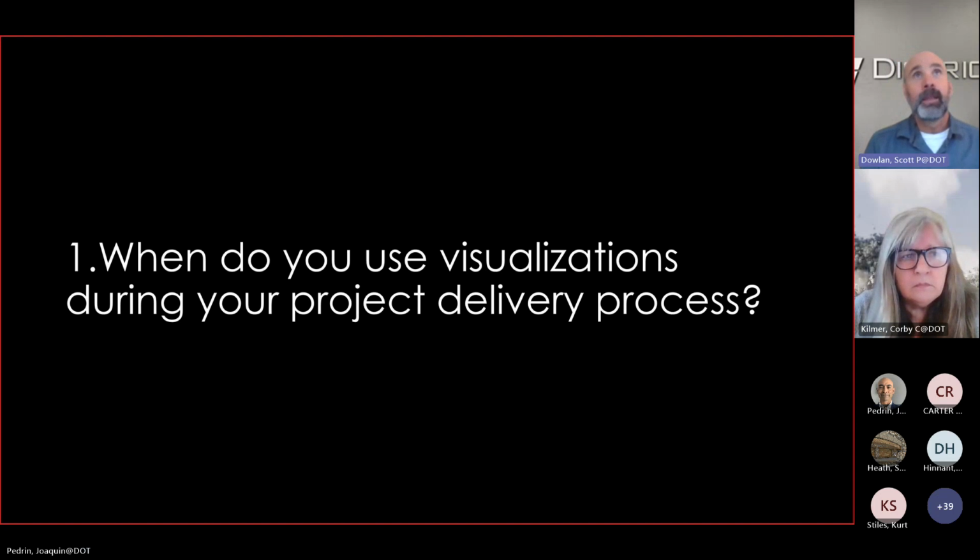Mm-hmm. And it's great timing having John do that at the beginning of the project, because at the end of K phase, that's when we resource our projects, right? That's when a functional unit or work plan is sent out. So right out the gate, we already know what the expectations are so that we can provide the necessary resources. That's right. Awesome. Great stuff, guys. Thank you.